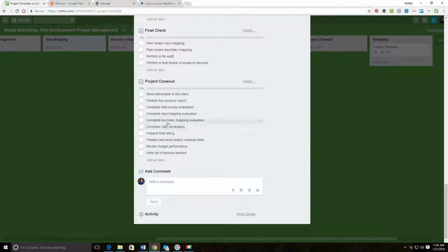How did the client treat us on this project? Were they good to work with? Were they a hassle? We'll prepare the final bill. We'll prepare and send a project closeout letter. That's a short one-page letter, usually goes with the final bill.